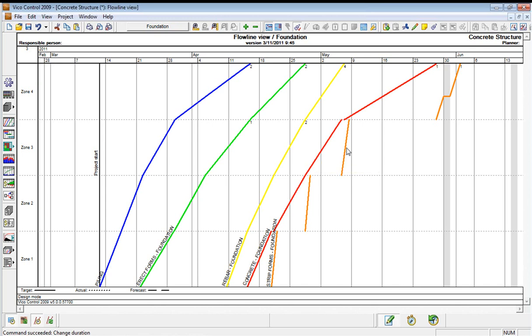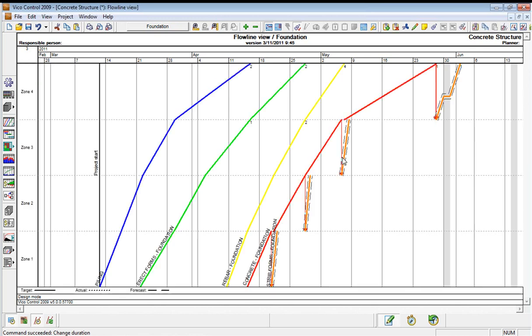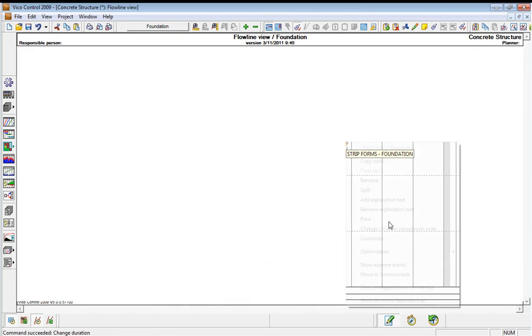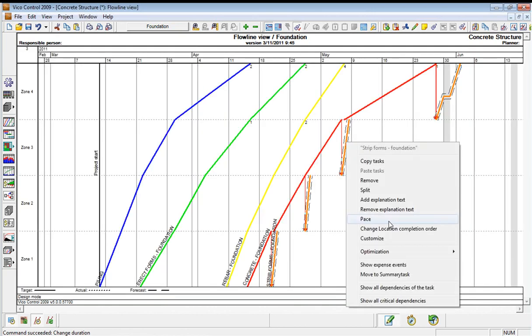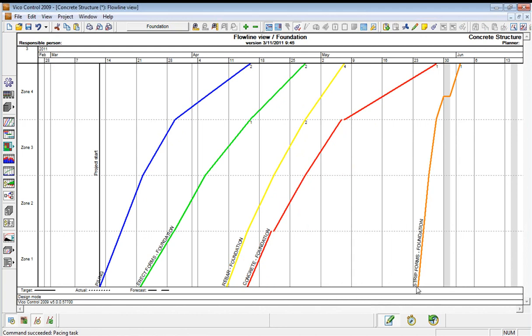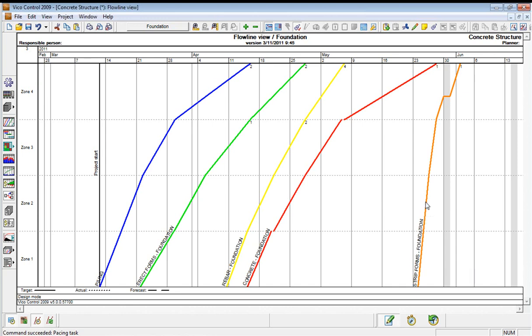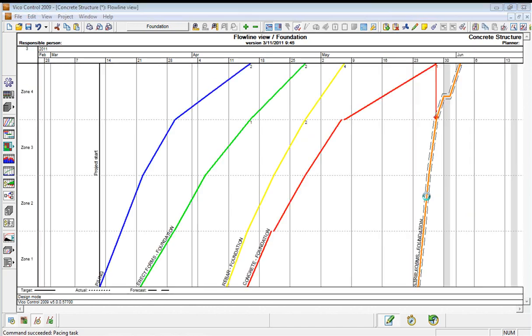Some of these trades are discontinuous because they are, for example, stripping the formwork. We could if we wanted to use the algorithms within the software to make sure that he works continuously. But it's a low resource and something that we probably want to strip a lot sooner. So it's up to us, but maybe we should leave it how it was.